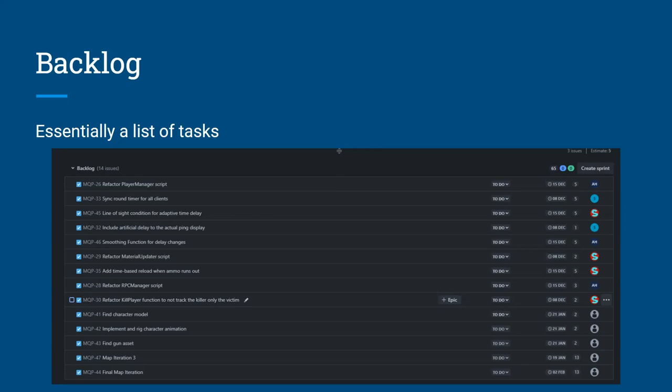So this is an example of a backlog I have for my MQP. And let's just say a lot of the refactoring tasks that you see up here, those are not there before. And those were the result of our numerous code reviews that we do as a team. So embrace the uncertainty. Don't think that you can know exactly what tasks you need to make this game. You will not, you will have to add onto it in the end.